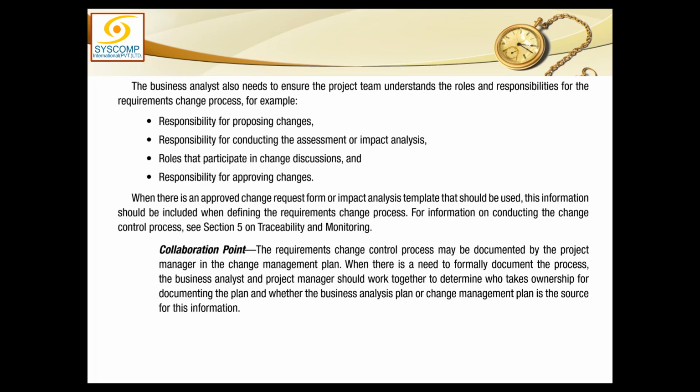The business analyst also needs to ensure the project team understands the roles and responsibilities for requirement change process. For example, who is responsible for proposing the change? Who is responsible for conducting the assessment and impact analysis? Roles that participate in the change discussion, responsibility for approving the changes. So these roles and responsibilities must be clearly defined. When there is an approved change request form or impact analysis template that should be used, this information should be included when defining the requirement change process. For information on conducting the change control process, we will talk about it in traceability and monitoring last chapter.